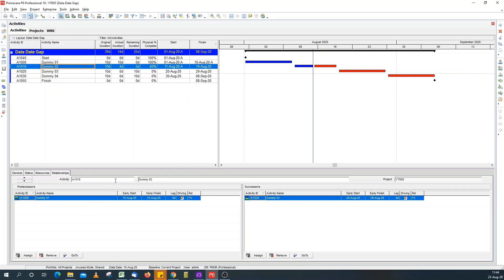But in this case, our data date is the 15th of August, and our single predecessor also has an early start date, 15th of August. So, it's not an out of sequence logic problem.